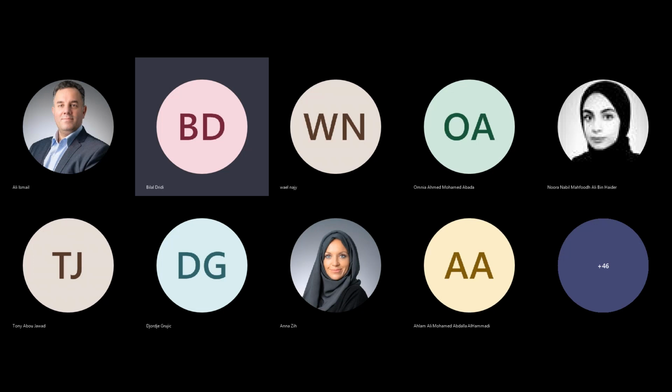I will give you an example because I have my own common data environment. I'm managing different projects with different scales in one common data environment. The difference you can see is in the project template, because a template of a building is not the same as a hospital or school or university. For sure, the project team members will not be the same. Maybe you will find the same architect in three projects, but you will not find them in other projects. But as a process, it's the same. Like the naming convention, it should be the same. The workflow should be the same. The permissions or folder permissions strategy should be the same.